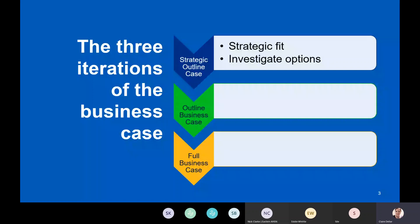Does it fit with the organisation's strategy? What you want is permission to investigate options. So maybe you've identified a particular area the organisation could succeed better in, and you're going to investigate options for fixing that need, problem, or opportunity. The second iteration is the outline business case — the chunky one — where you outline all of your options and show how you've narrowed them to a short list. If you're going out to tender, you produce tender documentation for suppliers.